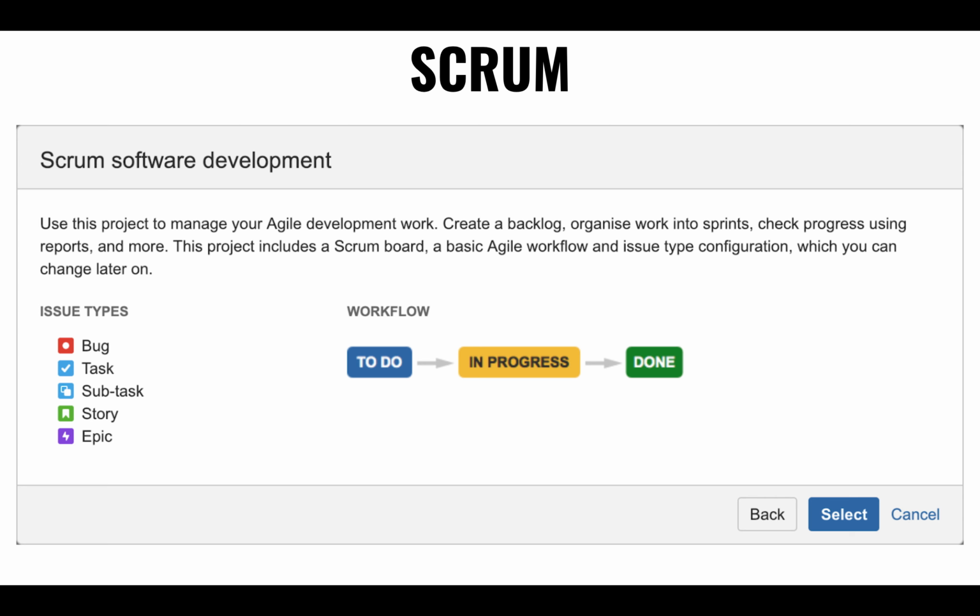An epic is a big user story, right? Something that needs to be broken down into multiple user stories that deal with the idiosyncrasies, the details. The admin, the user administrator, right? The epic is going to include, I want to be able to create a new user, delete an existing user, update an existing user, navigate through the list of users, sort users, X, Y, Z, right? All the stories are going to be associated.